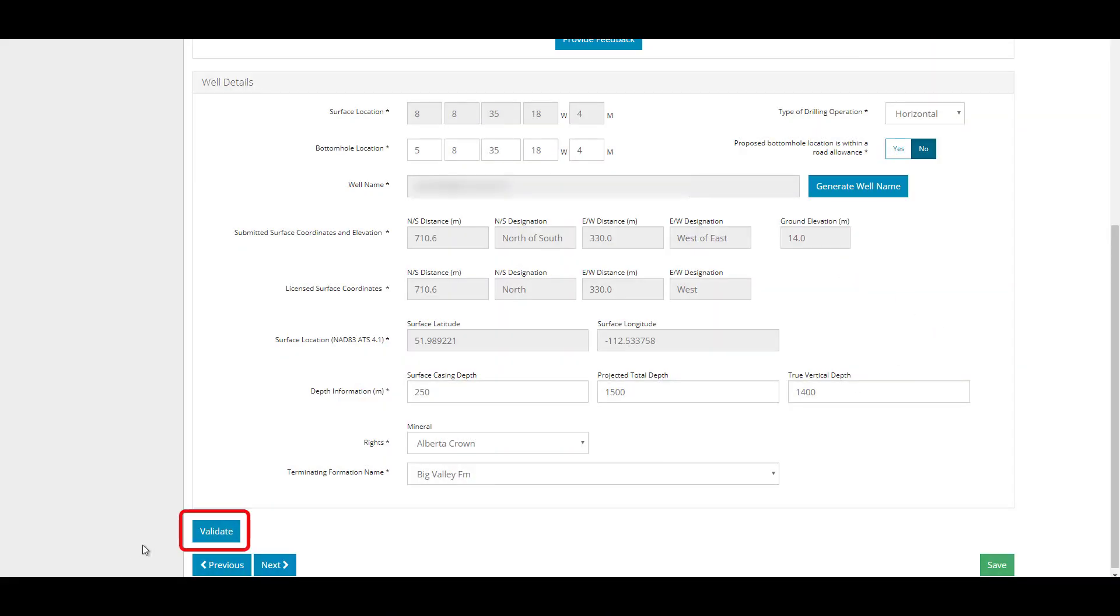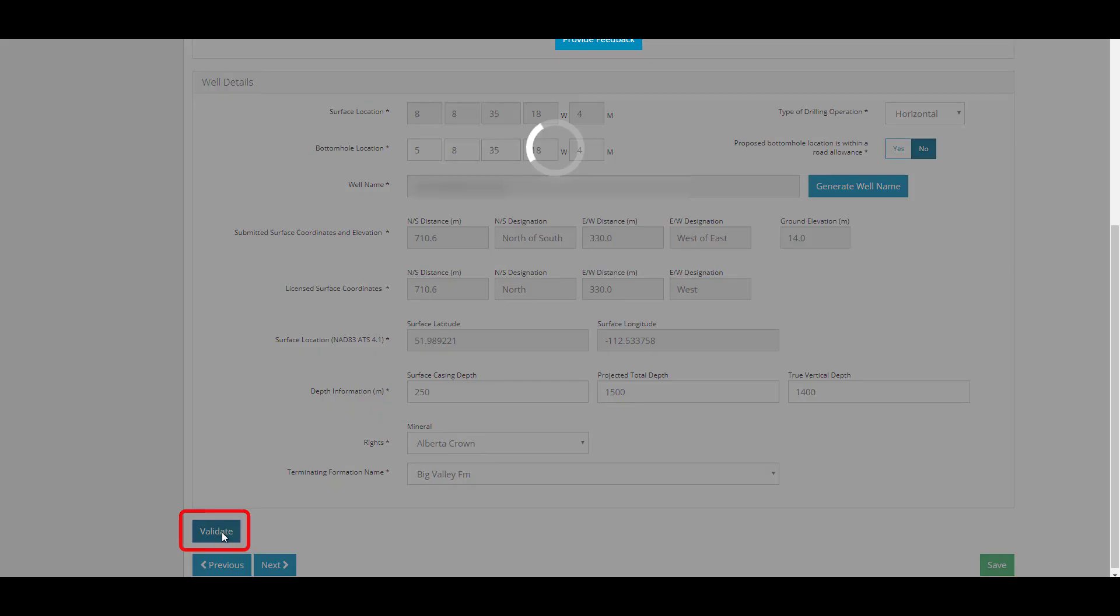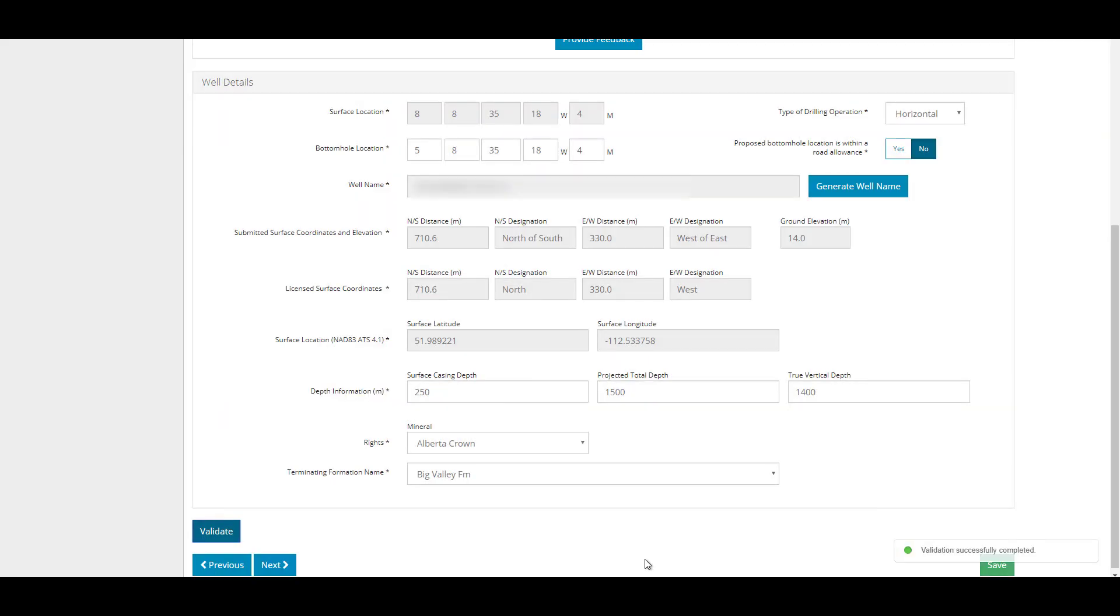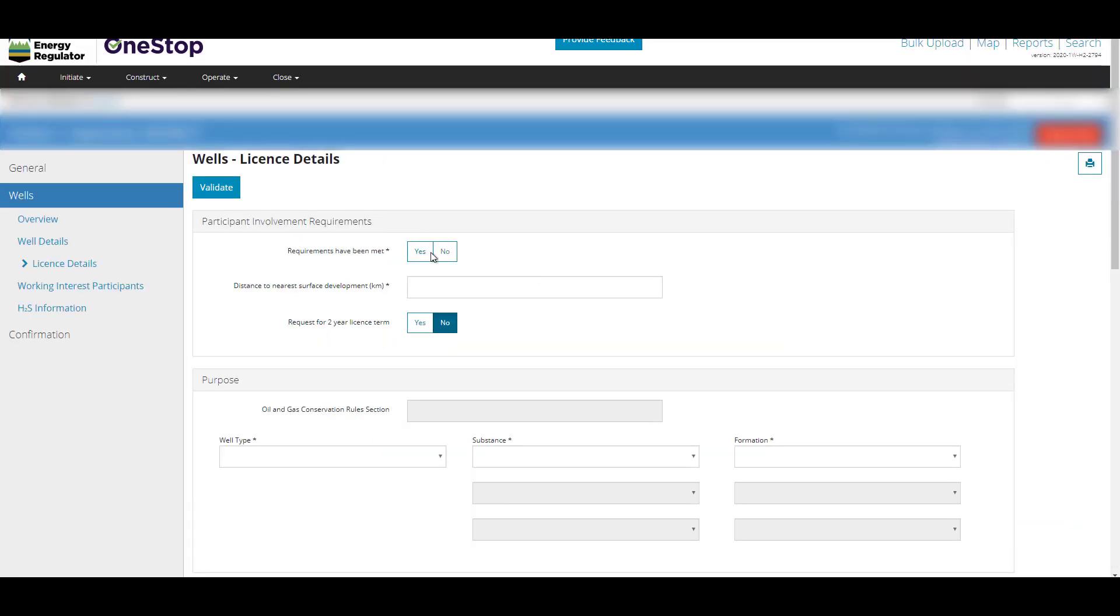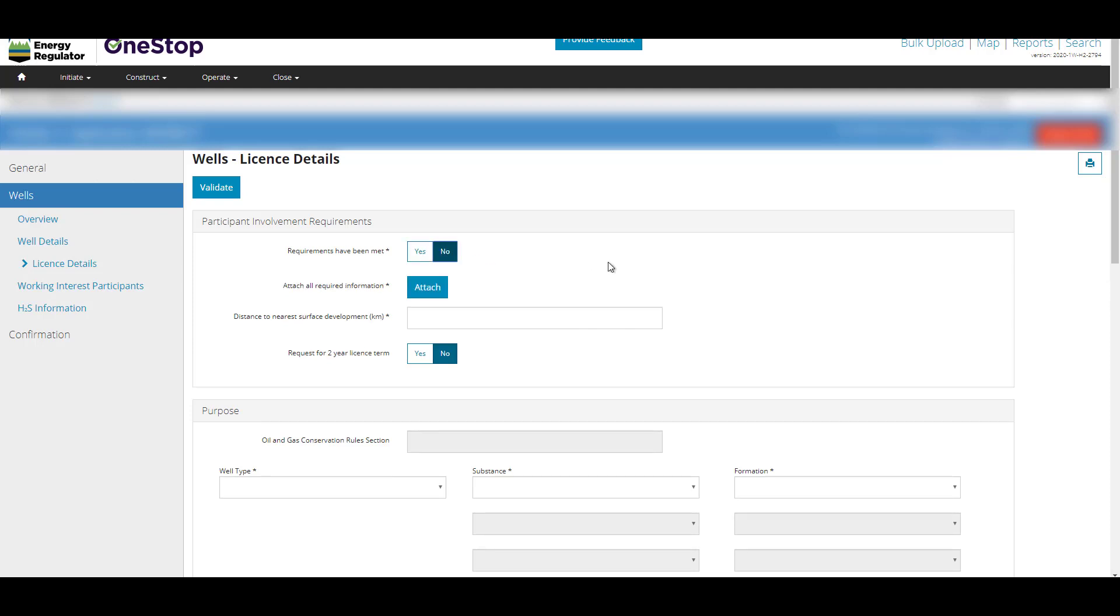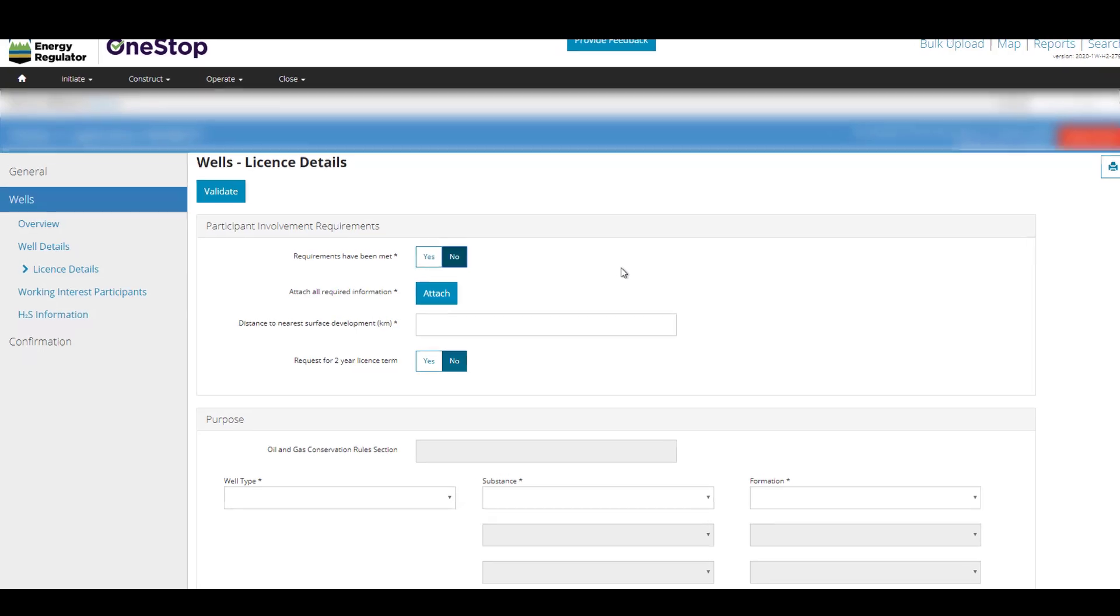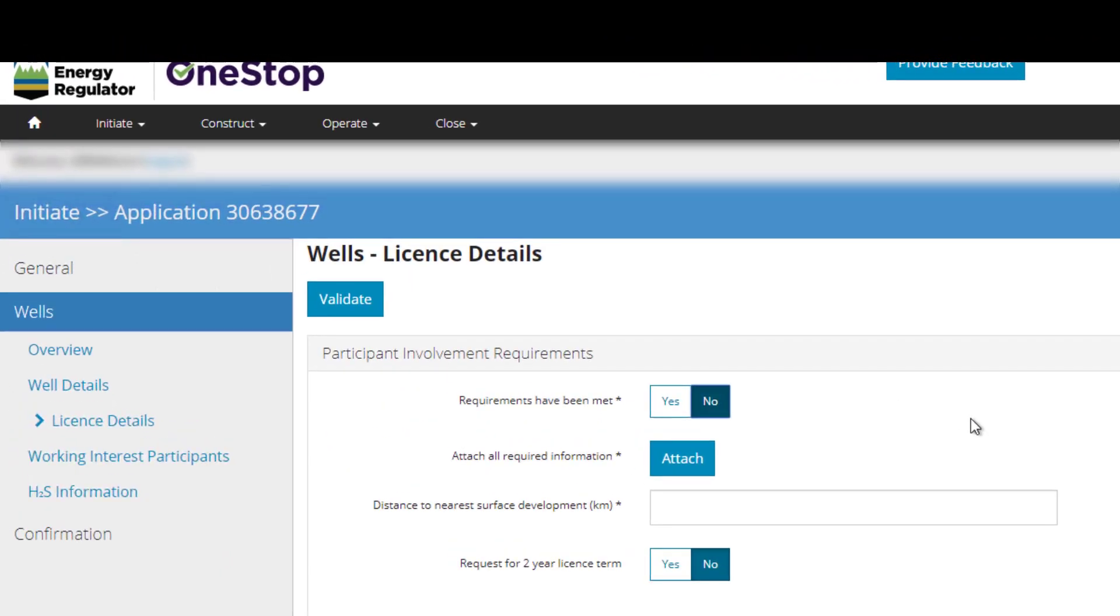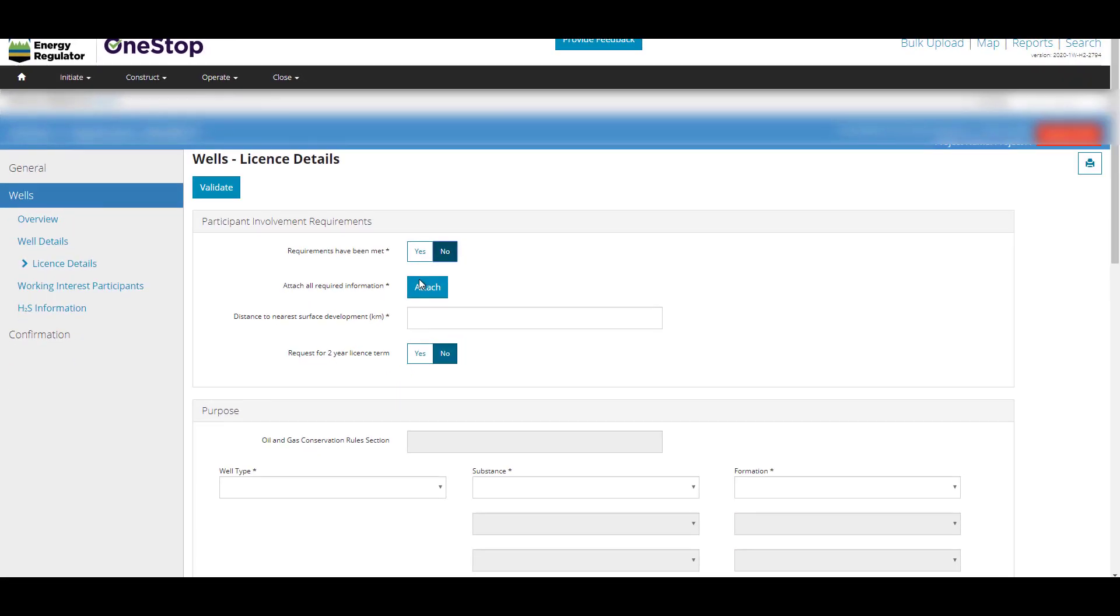Click Validate at the top or bottom of the screen to check your data. Click Next. Fill out the Well Licensed Details page. If this is a multi-well application, the information entered on this page and the rest of the application must apply to all wells in the application. If D56 requirements will not be met or variance is requested, then you will be prompted to attach additional information.